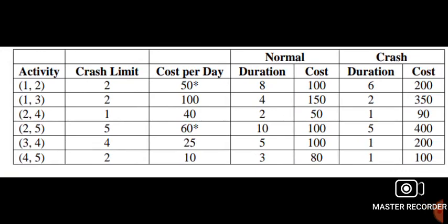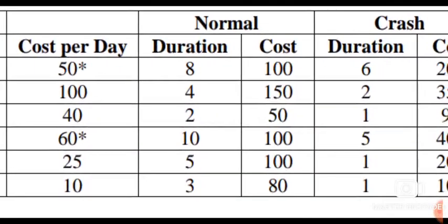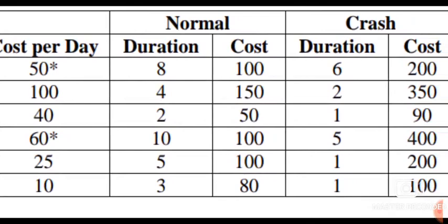First of all, we want to know the overall cost of this entire project, having to do all those activities. I'm zooming in on the normal costs part of this table. Sum them up. That is the overall cost of doing all the activities stated in the question. If you add that up, it will give you 540. Sorry, 580.